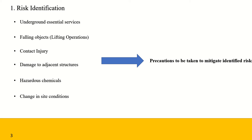For example, to prevent damage to essential underground services, before the commencement of any excavation work, a permit to dig should be issued by the relevant authority. Information about the location of essential underground services — including gas, water, telecommunication, and electricity — in and adjacent to the workplace must be established before directing or allowing excavation work to commence.